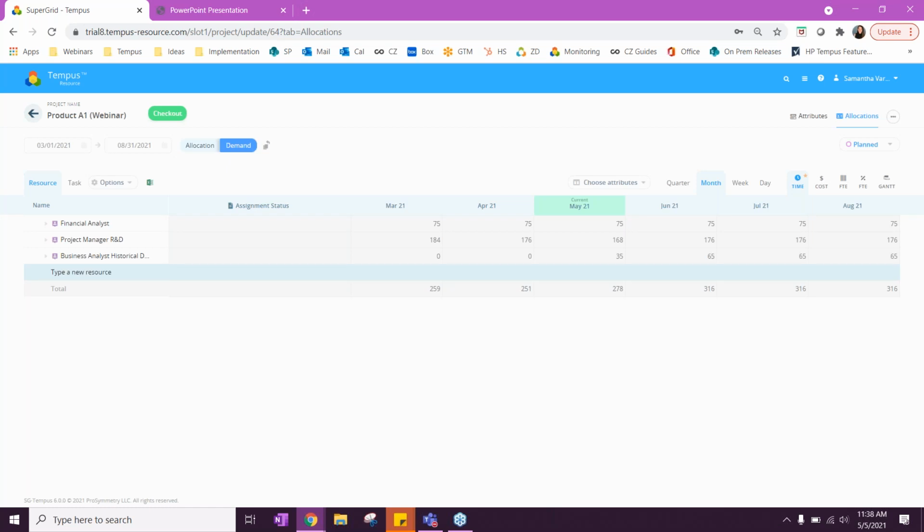Tempus gives you 2 data sets to hold your allocations in and create those assignments. So the demand data set, we often see it as that pre-active, so your proposed projects, your projects that you're planning for, maybe a project that hasn't even gotten to a business review yet, but you just want to see if we were to do this, where does it live?